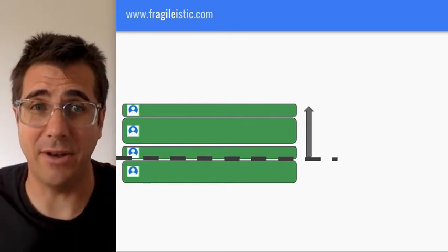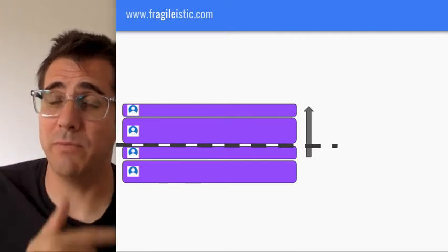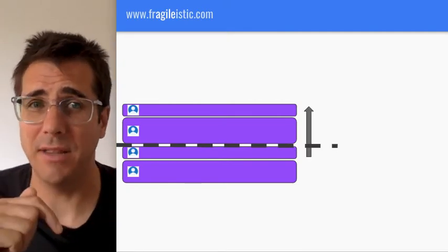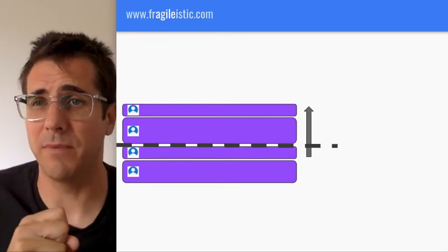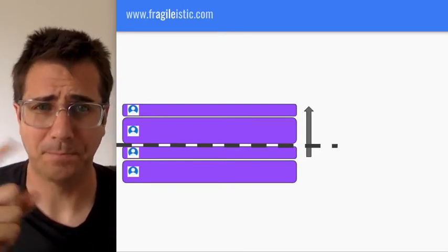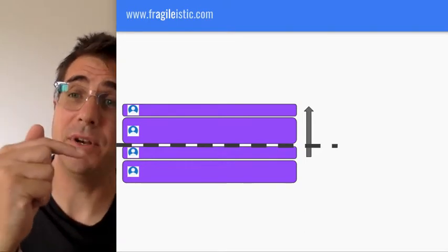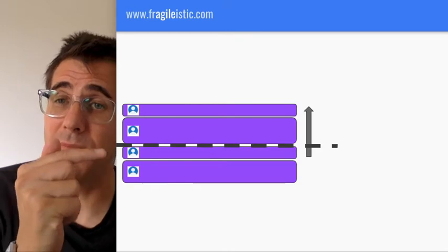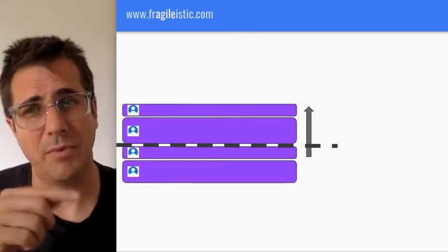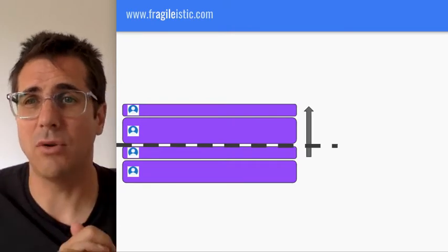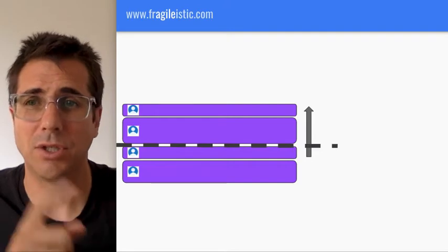Now, if you want to scale that up, and I'll quickly touch on scale, you would do that quarterly with the customer value. How much of this value can you deliver in the next quarter? And you'd say, well, we can get those 2 delivered because we know the capacity of the team and the velocity that we work at. And so we'll draw the line there, we'll deliver those 2 this increment, and we'll come back and look at these maybe next increment, or that might change, priority might change, and that's the beauty of agility. So when we're talking about customer value, like I say, they're called features in Azure Boards and in the SAFe framework.